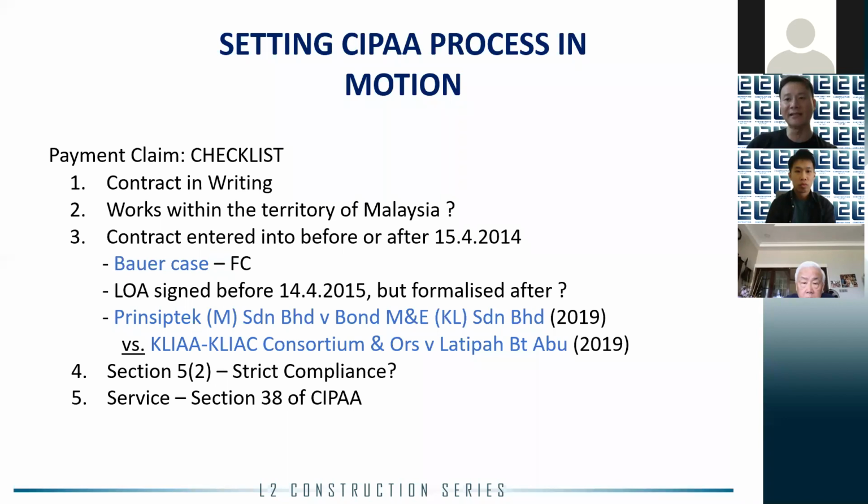In Princip Tech, the court held that it was a contract entered into prior, even though the contract was formalized later after the commencement of CIPAA. There was no change to the intent of the original letter of award, which was signed before 15th of April 2014, and therefore it fell outside CIPAA parameters, and therefore the decision was set aside.